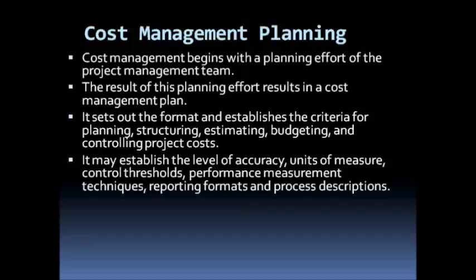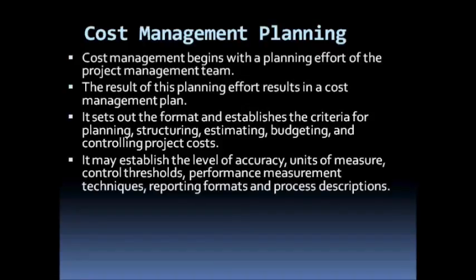Then we will determine what performance measurement techniques we will be applying on our project. We could talk of techniques like earned value management, for instance, to control costs on our projects. Then we will also state the reporting formats and the various cost management processes that we will be adopting on our project.